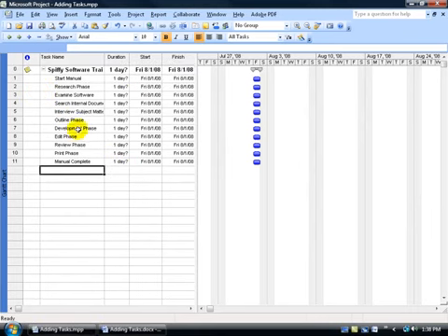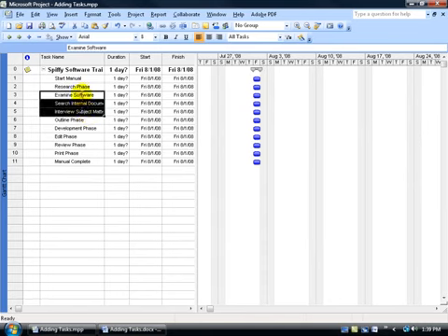Now moving along, you'll notice that it's in bold, it's up at the top, it's our goal, it's the overall project goal, and in order to complete our goal we have to complete all these mini subtasks here, okay? Including summary tasks, which are the summary task of subtask. So when you look in the hierarchical structure, you've got your subtask to this summary task, but this summary task is to that summary task. So yes, you could have summary task within summary task.